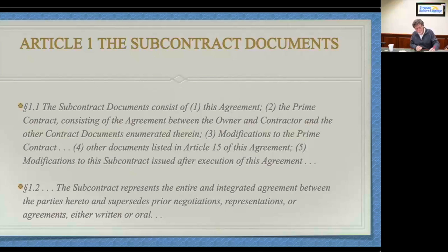The last language here, that this contract supersedes prior negotiations, representations, agreements written or oral, is what I call a zipper clause. It zippers it shut, and those things are out, okay? It doesn't matter what was in your quotation. It doesn't matter unless your quotation is specifically identified as a contract document. And if it is, you ought to put the date of that quotation and you ought to attach it to the contract as a contract document, because a quotation, a bid is gone. It's zippered out by way of the zipper clause. Too bad, it doesn't matter what it said, okay? Doesn't matter what it said.